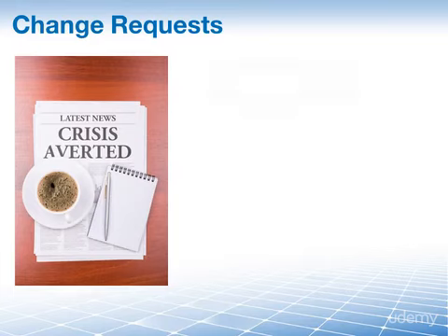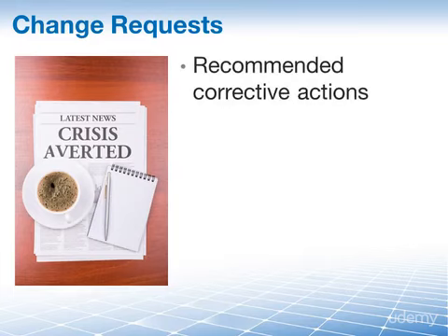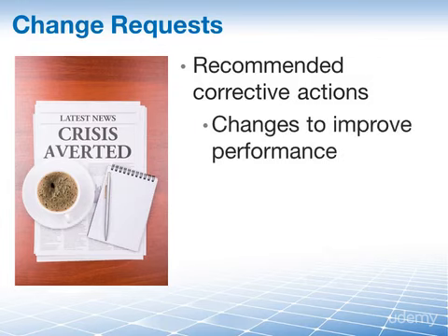These change requests can be corrective actions, including changes to bring the expected future performance of the project in line with your project management plan. For example, a corrective action change request would be optimizing the code on a software project to calculate equations within the quoted time frame. Another example would be adding resources to a project to improve schedule performance.